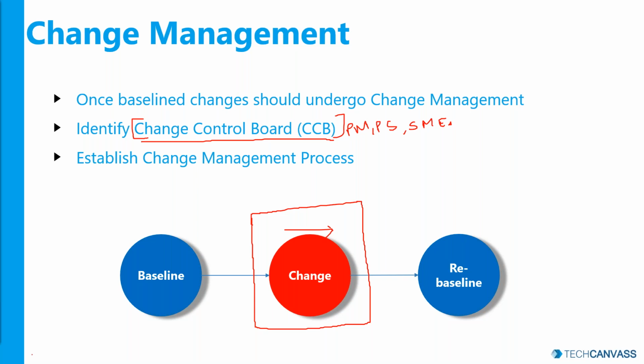They'll review everything, and if they find it okay, they will approve, right? Once they approve, he can communicate the new change to all the stakeholders. He can even communicate to the stakeholders that this is the request that has come and we are reviewing it. But again, the important thing is it has to undergo the change management procedure. The second aspect is he needs to communicate it to the stakeholders based on the power versus interest, as you mentioned. For high power, high interest, he may go and communicate one on one and ensure that there are no concerns regarding that. So yes, in a way you are right, we can use that and communicate accordingly.